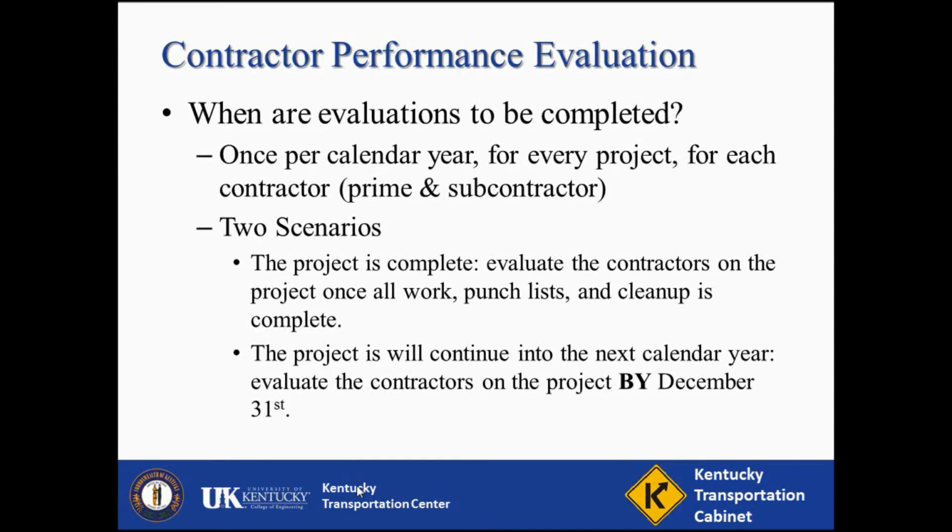The second question is, when are evaluations to be completed? These need to be completed once per calendar year for every project for each contractor, primes and subs, warranting evaluation. Under these guidelines, there are two types of evaluations.